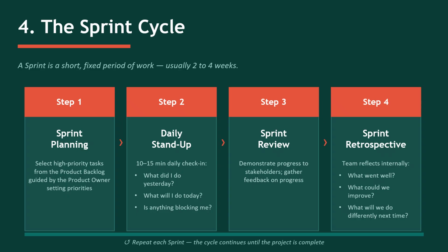Step 4. Sprint Retrospective. In Step 4, the Scrum team reflect on progress internally, without the product owner or any stakeholders present. The Scrum Master will often facilitate this session, although the team may soon become so proficient at working together that they can facilitate their own review.